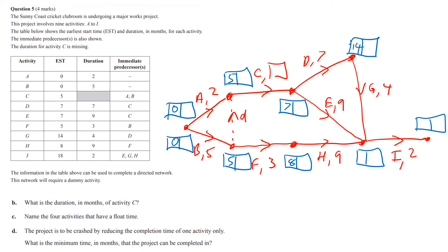The EST of G is 14, and the starting point for I is 18. Then 18 plus 2 gives you 20. So what is the duration in months of activity C? Looking at the diagram, C goes from 5 to 7, so activity C must have a value of 2 — the only way to get from 5 to 7 is by adding 2.